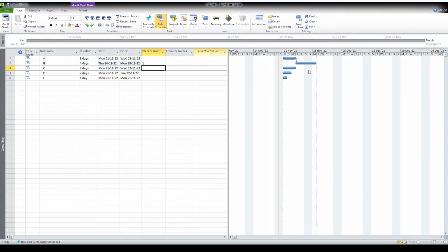So this task has become finished to start. Now I will give, for example, the next one, start to start. So that task is second number, so I'm giving two, yes, yes, start to start. So when I gave two yeses, these two tasks have an assignment as start to start.